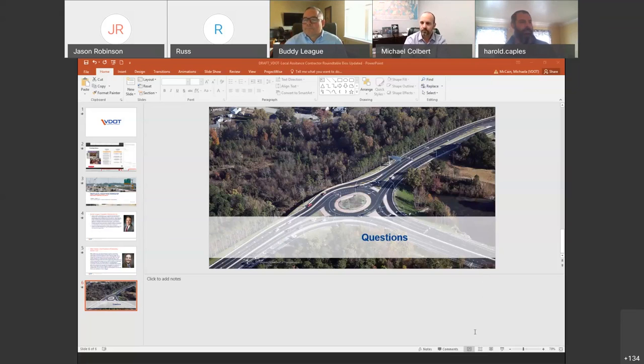I'm going to weigh in here and then I'm going to kick it over to Mike and Buddy again. I would say yes. A week's getting a little, I mean, we provide answers up to the day. We have lettings on Wednesdays. We accept questions up to the Friday and I'm posting answers up to the morning of bid letting, based on timing, just to try and get that information in their hands. Buddy and Mike can speak to this firsthand, they don't like making changes up to the last minute, but they want to be competitive and they're putting a bid together to win the job. So I know sometimes changes are happening. We start reading or downloading bids at 10:01. I've seen some bids coming in at 9:58, 9:59. So I know those changes can take place up to the last minute, at least for us and how we accept bids. I think that time frame's good.